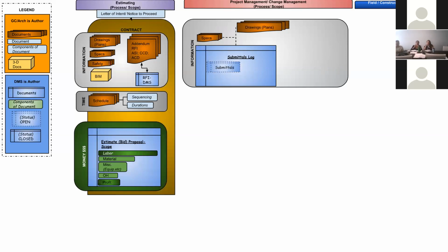Please keep in mind that the general contractor and owner is trying to manage, on average, over 70 subcontractors, all at different phases. So they're trying to herd the cats around all this information, saying, here's what we got, and they're trying to get the documents in line with the drawings. Sometimes the drawings are more accurate than the specs, and sometimes the specs are more accurate than the drawings. So getting that clear is where project management and our development and our skill set will be looking, going, well, how well are we looking at submittals and making sure that we're in compliance.